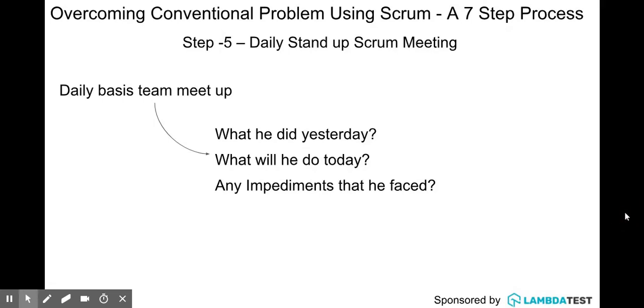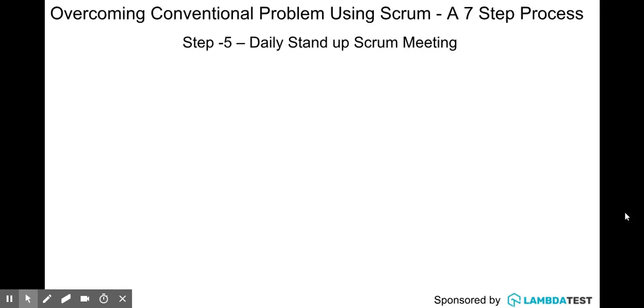And the Scrum Master is in charge of making sure that these daily scrums are routinely organized. Okay. Now, Jeff Sutherland also said that it's better that a project manager not become the Scrum Master of his project. The reason, guys, is when a former project manager steps into that role, there is a fair chance that everyone will fall back into their old patterns. The developers will expect him to solve all their problems, and he will feel obliged to do so. So a Scrum Master should be different from a project manager.